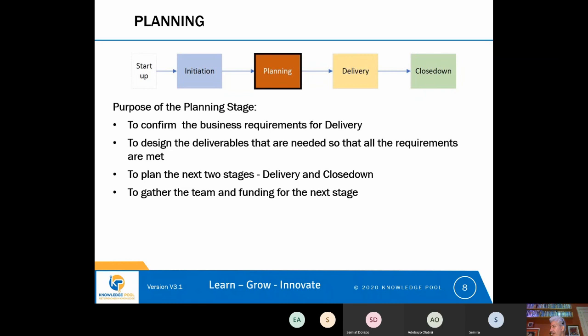So that's one way: identify the risk during initiation, assess how likely it is that you will pick the wrong CRM, and then decide whether that is going to cause you to change your approach from Agile to Waterfall so that you can gather all the requirements and make sure.